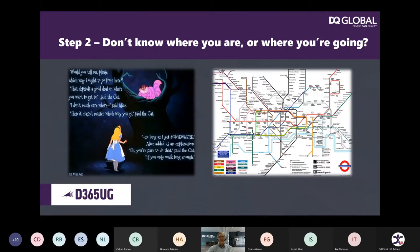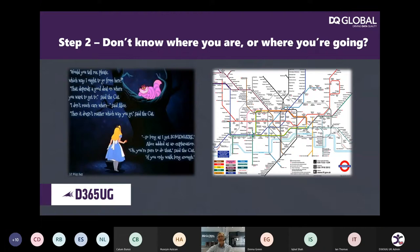So on this migration project, if you don't know where you are, you'll certainly never be able to figure out where you're going. In the context of migration, the first steps have got to be measurement — you've got to know where you are on the map before you can go somewhere. That would mean data auditing or data profiling: discovering the most occurring values, oldest dates, newest dates — the whole range that data audits and profiles have. The learning here is: if you don't know where you're going, any road will take you there. Ensure you know where you are, where you're going, and then you can plot your path.